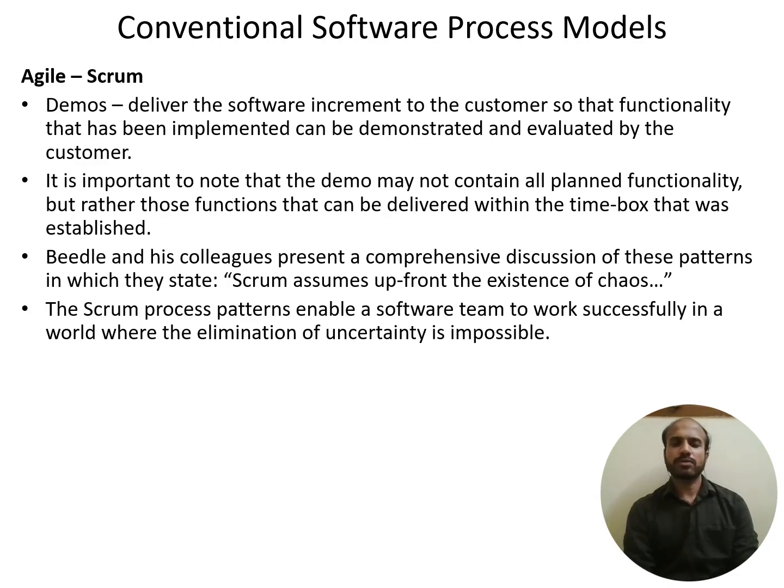So, demos. Demos will deliver the software increment to the customer so that the functionality that has been implemented can be demonstrated and evaluated by the customer. It is clearly evident that whenever a particular sprint has been completed, that is between 2 weeks to 4 weeks,